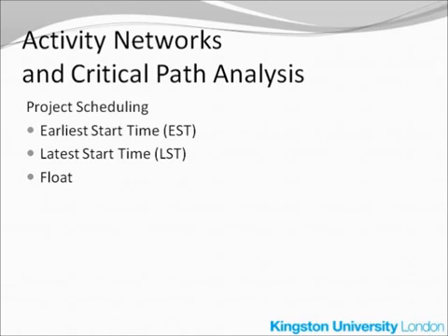In every project, there is a number of activities for which this float or tolerance will be 0, and we say that these activities lie on the critical path. Any delay in the critical path will directly impose the same delay for the entire project.